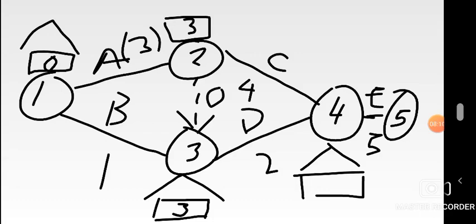Node 4. How do you get to node 4? I'm sure you're seeing what I'm seeing. Node 4 too has got 2 lines leading to it, right? There's one route passing from 1, 2 to 4, and 1, 3, and 4. 2 routes. Check again the same rule. When I look at earliest start time and there are 2 routes leading to a particular node, you get the highest of the 2. So let's start with the route from 1, 2 to 4. What figures are there?